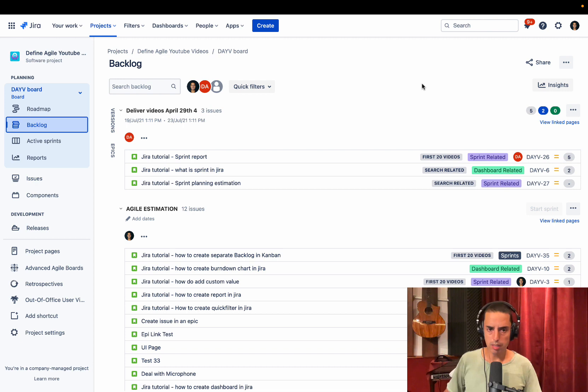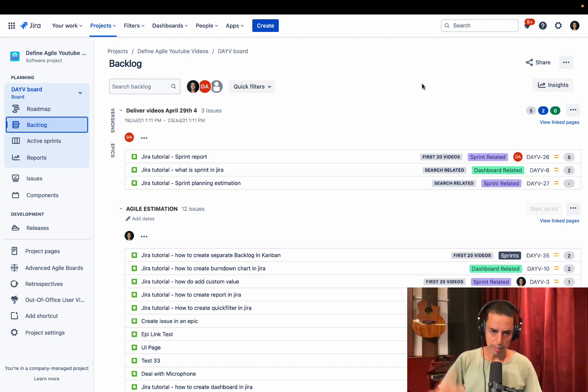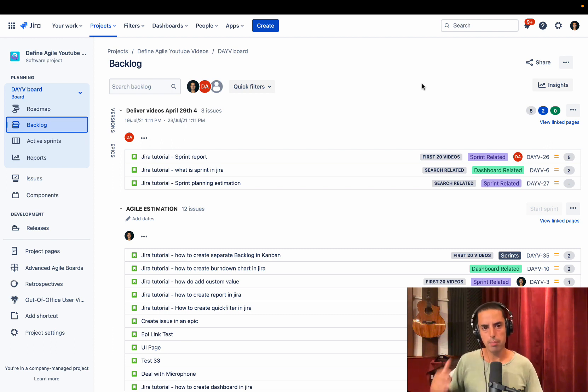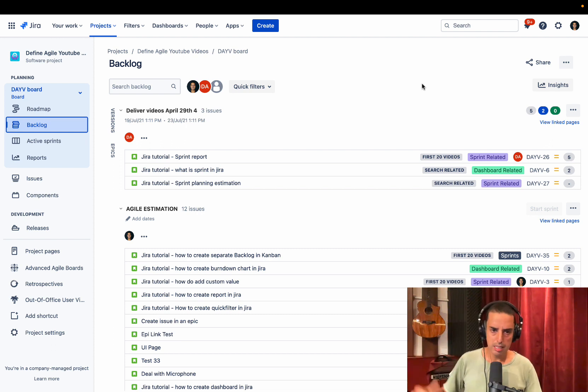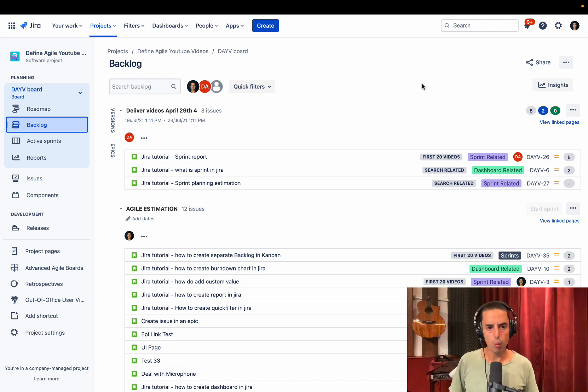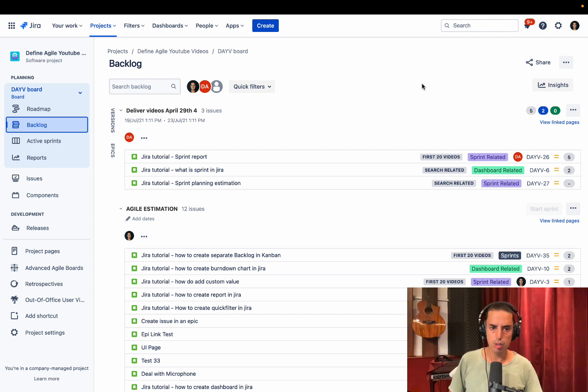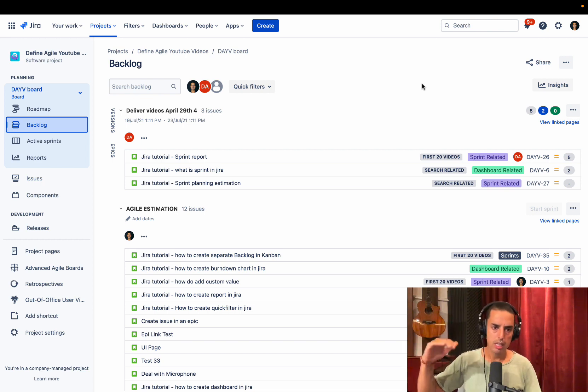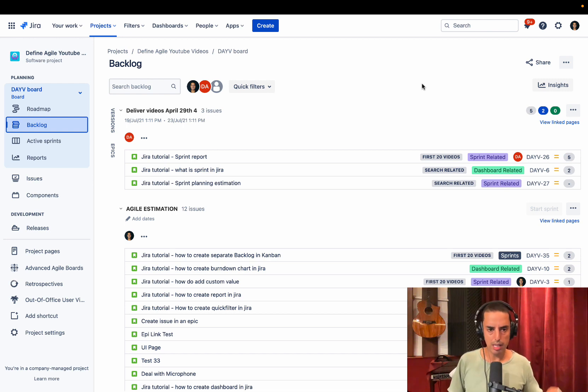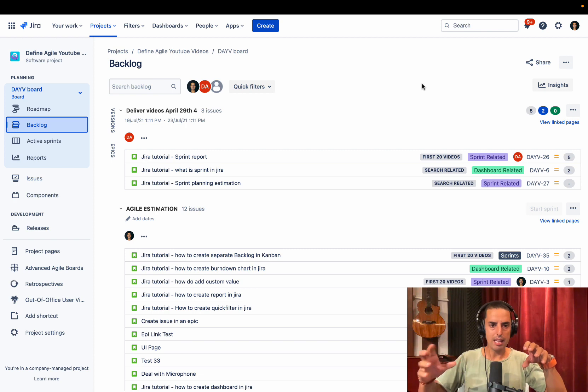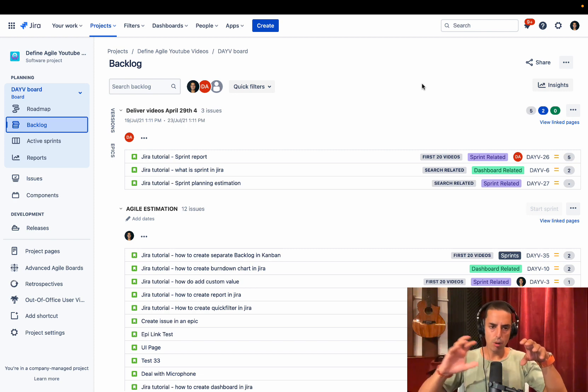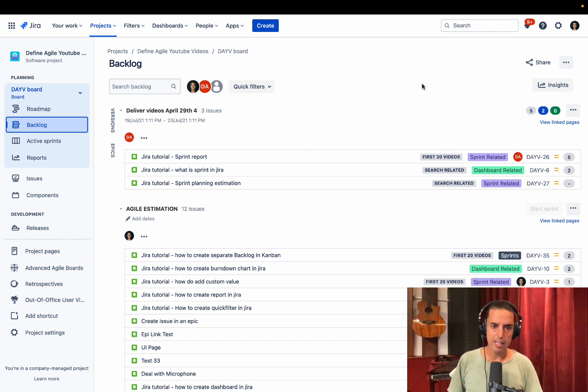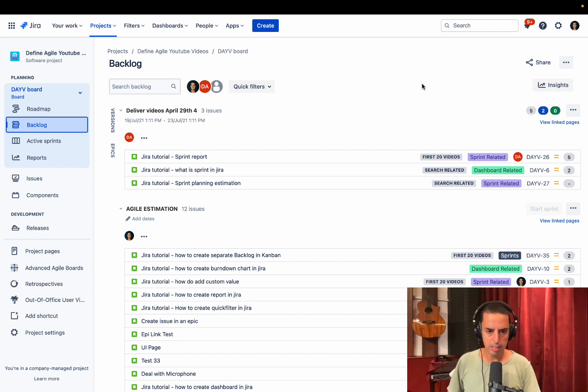Let's say you want to deliver something. Let's say you want to deliver a website, deliver YouTube videos, no matter what. You want to know a roadmap. You want to do certain releases and you want to make sure that your work is grouped. So in Jira, we're grouped by epics. And then we also can create releases and making sure that we have enough stories in those releases. So essentially, if we take a matrix, we would say we want to make sure everything's in epics. And then the stories also are going into the releases. And then this way, we can iteratively deliver software.